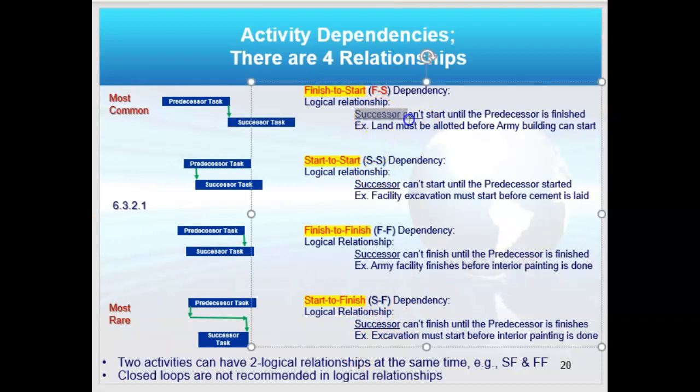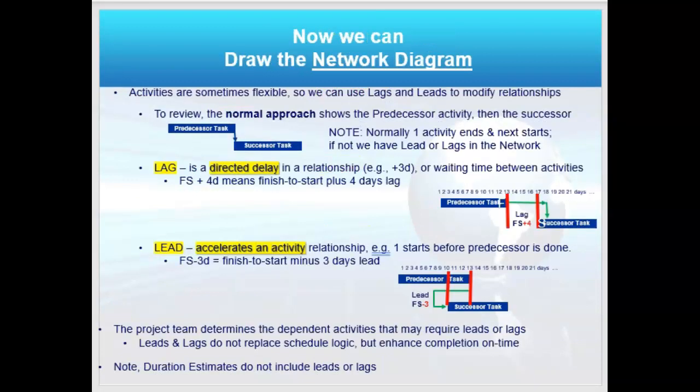Here are the definitions, and they must be known for the exam. You can read more about these in 6.3.2.1 of the PMBOK guide. Remember, finish to start is most common, and you will do the math of that on the exam. We'll talk about it in class. And start to finish is most rare. Again, I mentioned there are leads and lags.